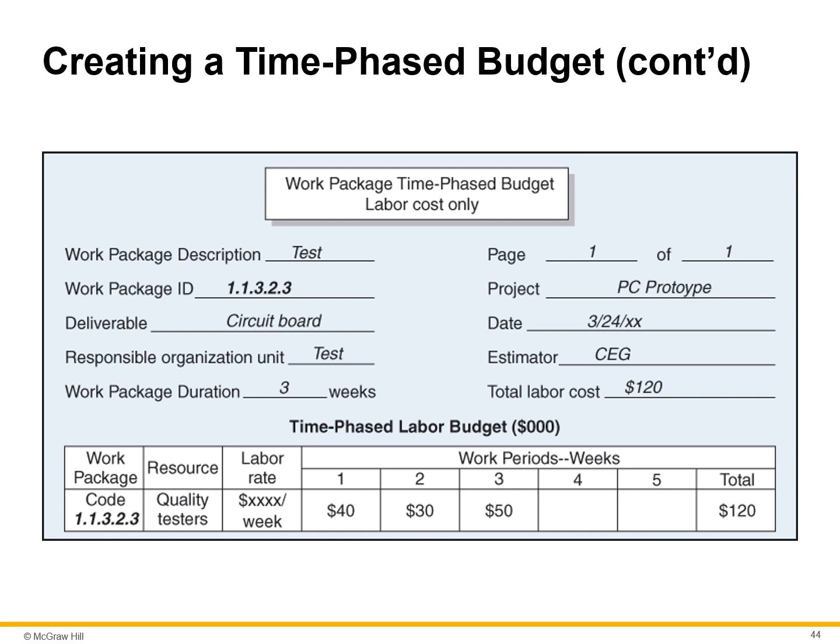This figure shows the work package has a duration of 3 weeks. Assuming labor, material, and equipment are tracked separately, the work package costs for labor are distributed over the 3 weeks as they are expected to occur. Respectively, when the 3-week work package is placed in the network schedule, the costs are distributed to the time-phased budget for the same 3 scheduled weeks. Fortunately, most single WPs become an activity and the process of distributing cost is relatively simple. That is, the relationship is 1-for-1, so budget timing goes directly from the work package to the activity.